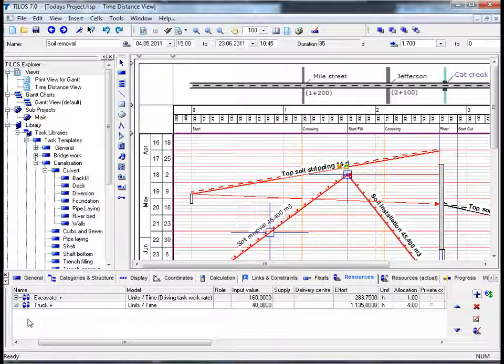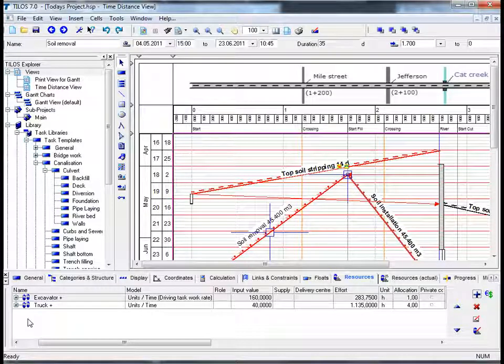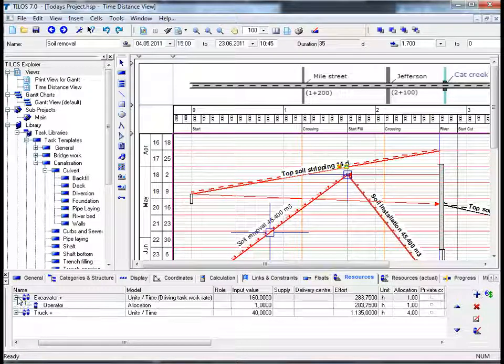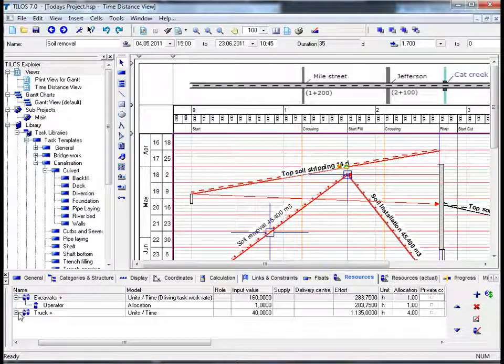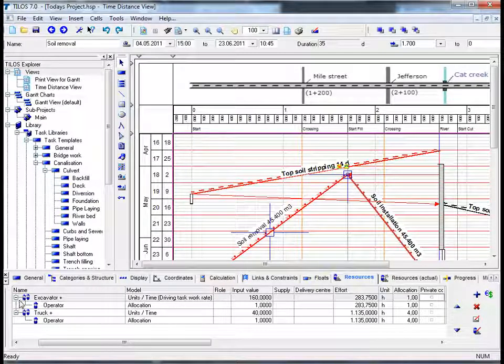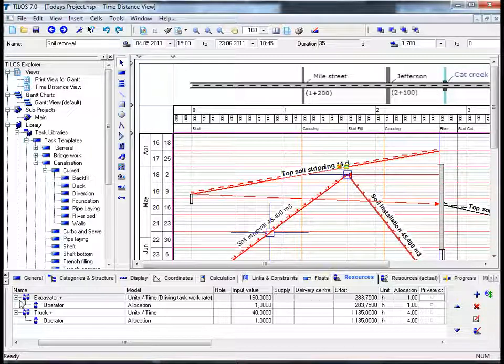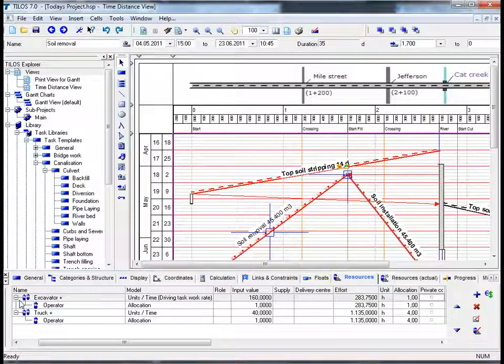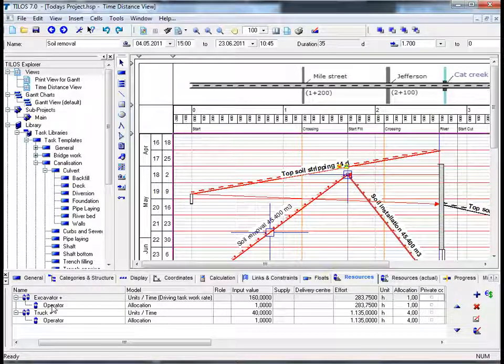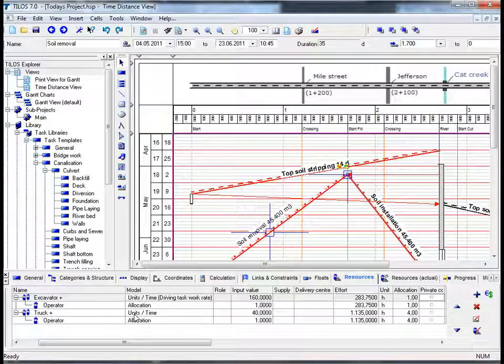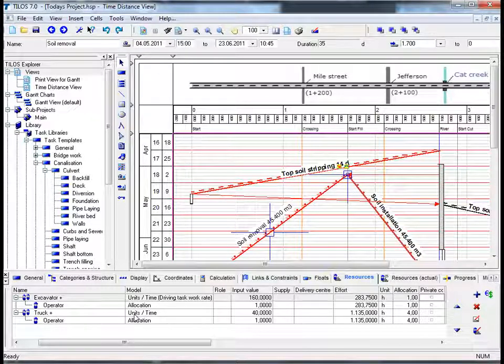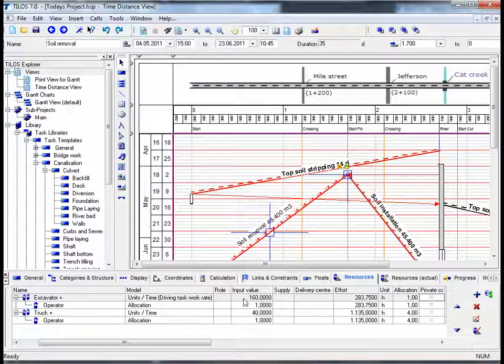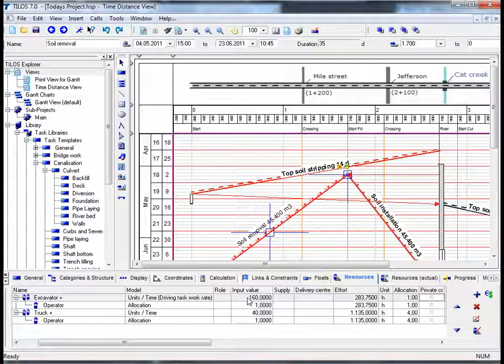If we then go into a little bit more detail by clicking on the excavator and then clicking on the truck, we can see that with the excavator it is a complex resource as itself the excavator and the operator are both assigned per hour to this task. The truck is calculated by unit and time, which means how many units can the truck carry away, also per hour.